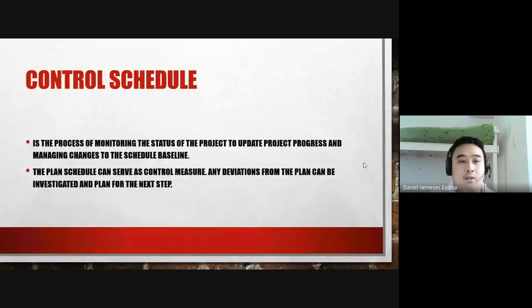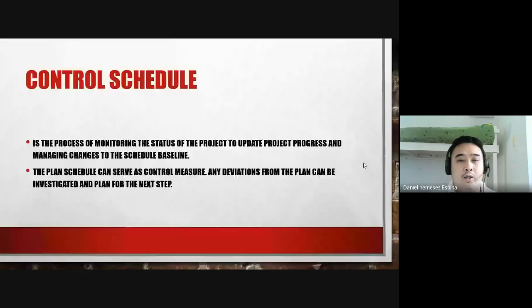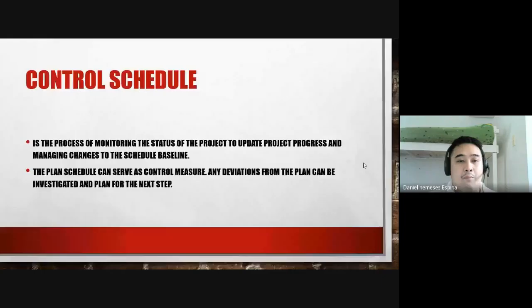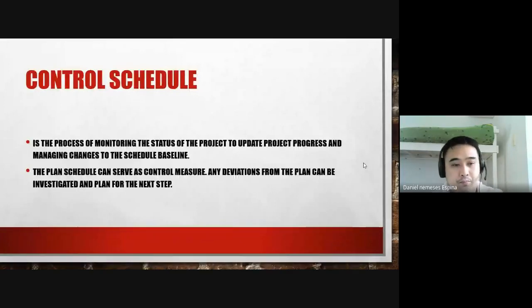The last process is control schedule — updating project progress and managing changes to the schedule baseline. The planned schedule serves as a control measure. If there are deviations from the plan, they can be investigated and addressed. Notes from deviations can also improve future projects with similar scope.